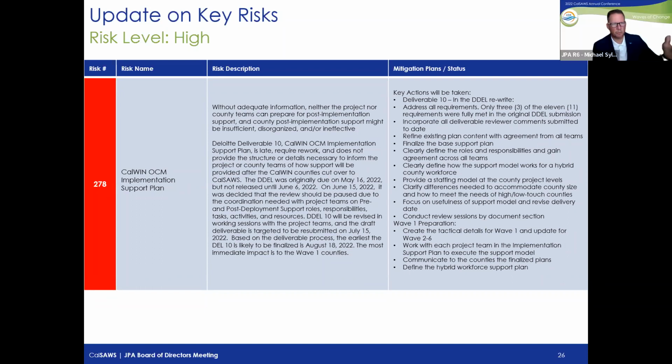And I remember earlier, before we actually took all the C4 counties on, there was scaling by waves, and the CalWIN entirety required a number of scaling efforts. Are all of those in place, or do they need to be in place for the initial launch of CalWIN? They are in place, and our current testing shows, and that was one of the medium risks, the batch window. Our performance testing on batch shows that we are meeting the batch window with that wave 1. So we have confirmation there.